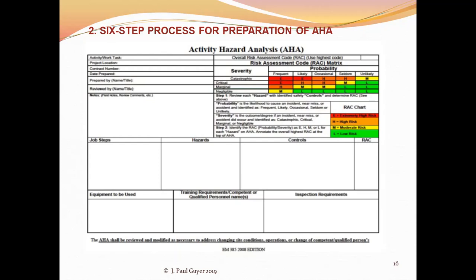And so inspections can be both initial inspections, and then you figure everything's okay, or maybe this is of such a hazardous potential that there need to be periodic re-inspections. Go out at noon and see that things are going smoothly.